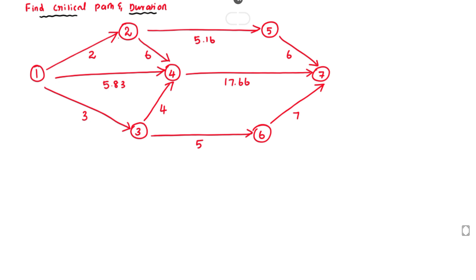The first network path is 1→2→4→7. The corresponding duration is 2 plus 6 plus 17.66, giving a total value of 25.66.